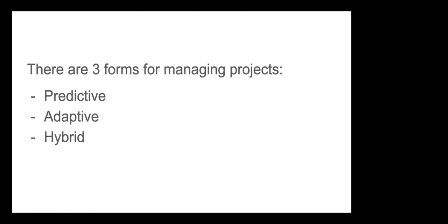That one is change driven. So that way, you are free from the restraints of having to follow a clear plan strictly. In the adaptive mode, you are not under pressure to have clarity of the whole journey from the beginning. No. What adaptive will do for you is, okay, let us not view the whole project from start to finish. Let us go step by step. I only need to know how to take my next step. That's all. Once I finish taking my next step, I will plan the coming step.